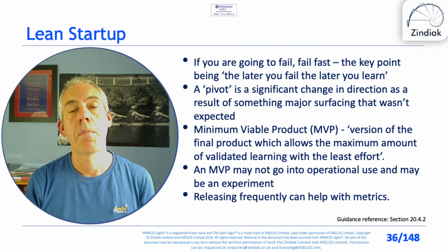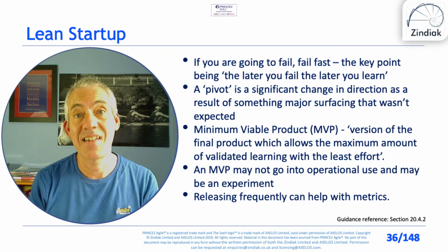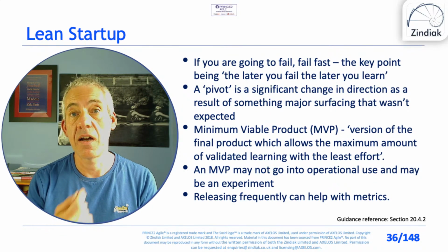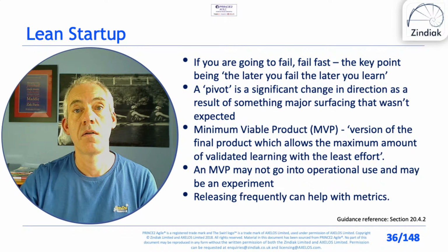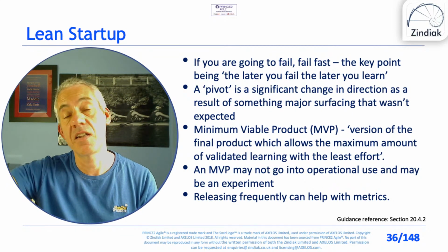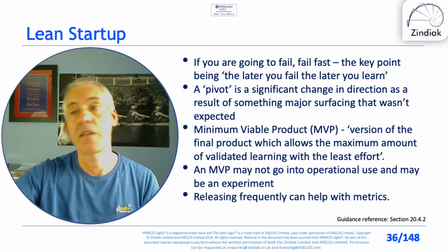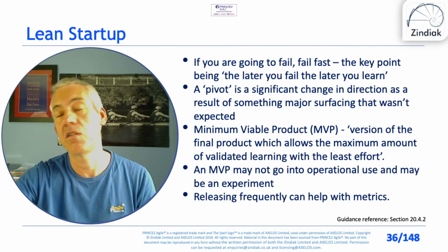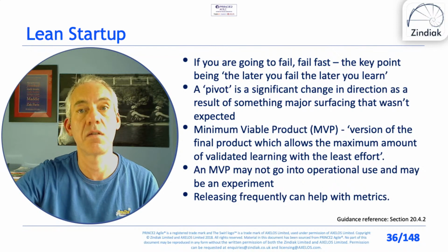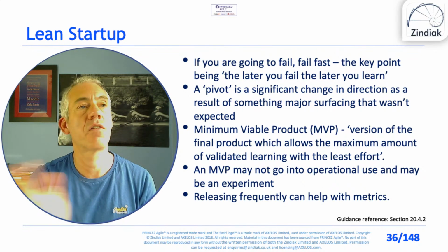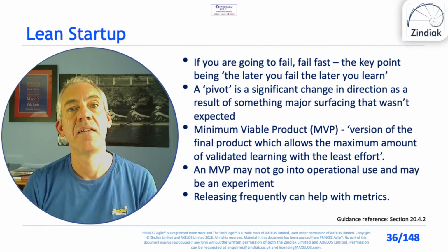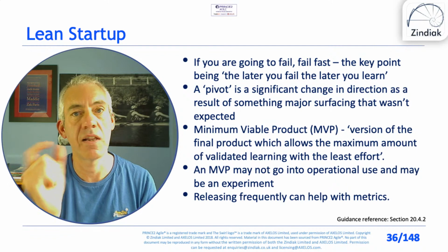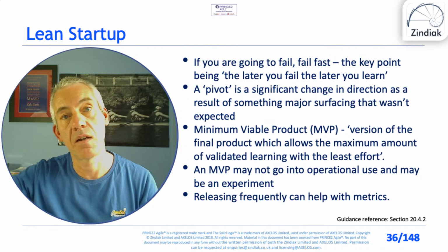Particularly if you're in IT, one way that I certainly do this is early on, I'll sit down with the customer, maybe around a whiteboard, and sketch things out. I'll say, this is what you've told me. This is what I'm thinking of delivering for you. This is what it'll look like. We'll have a screen like this. You'll hit this button. You'll enter there. There'll be this. Is that what you wanted? No, you've completely misunderstood me, Matt. All right, okay. Well, let's rub that out. So I've failed fast, but I've spent very little time and effort failing, and then we can hopefully succeed.